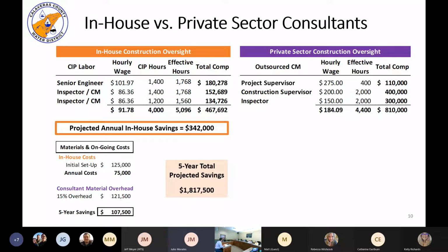Oh, let me say it differently. I now had the percentage in here. It's 2,080 hours a year, less what we were expecting in developer or labor reimbursement. So we were anticipating about 1,144 hours would be reimbursed, or about $100,000, for things like the General Land project or developer related projects. So that meant the remainder gave us 5,000 hours of labor.